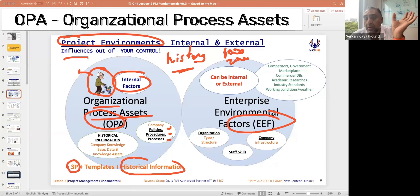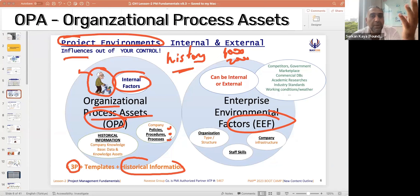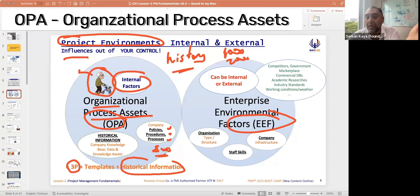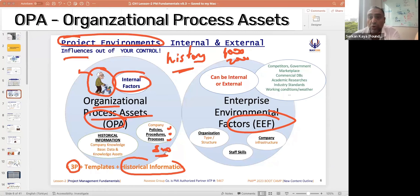OPA includes the 3 P's: your company's policies, procedures, and processes — these are important influences on your project. For example, your HR policy: hiring new staff may take six months and will affect your project. Procurement: procuring hardware may take eight months. IT policy: a broken laptop replacement may take three to four months. These policies and procedures affect your project.